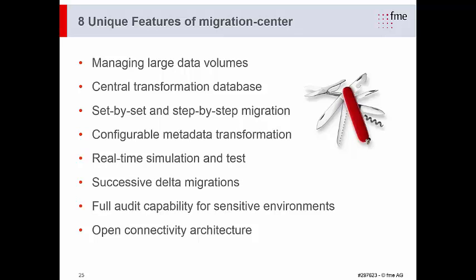More importantly, real-time simulation. We can run through the scenarios prior to processing the information so we can look for any anomalies that may come out in the data migration mapping, and which is very important, Delta migration. Most customers that we work with have productive systems in place, so we're able to consume, collect, and process that information while the production environment is live and handle the incremental changes as we come to more of a cutover approach to go live with the future platform.